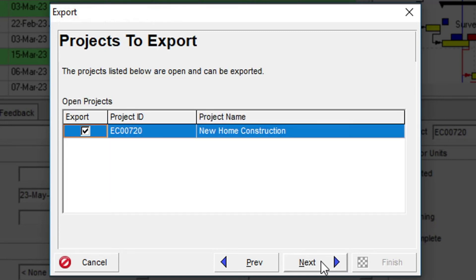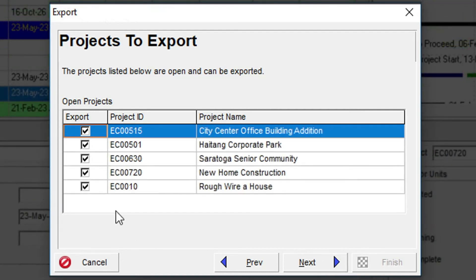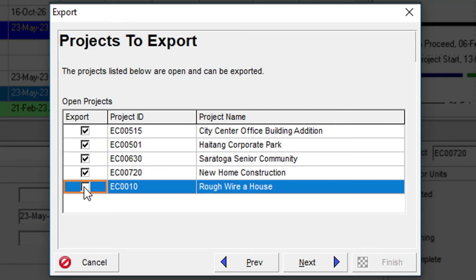In the Projects to Export dialog, we can select the project to export. If we have more than one project open, we would see a list of those projects. We could choose one or more of them to export,